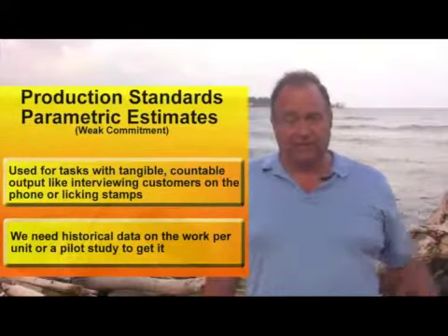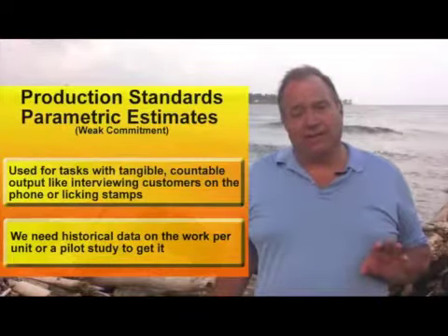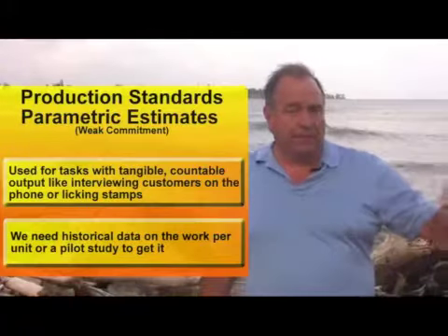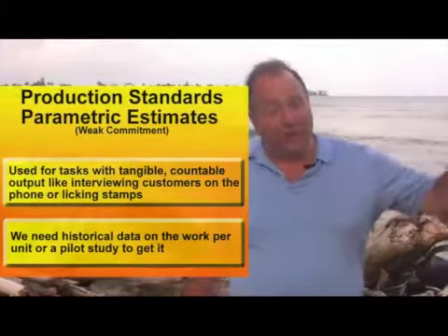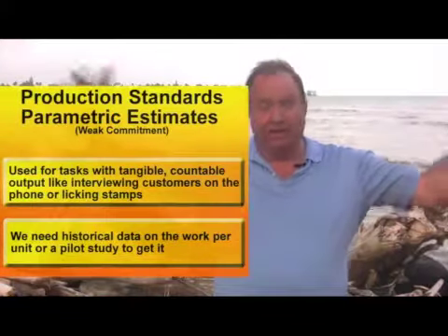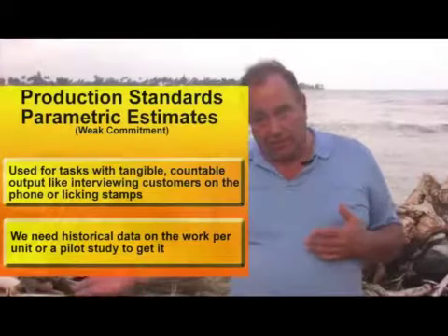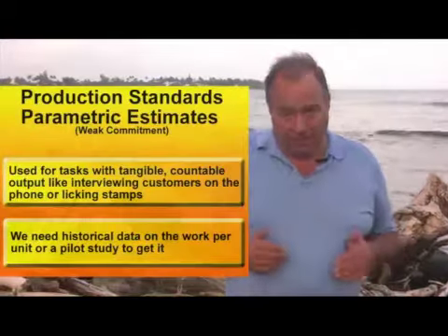Or let's look at this GUI computer data entry screen we're designing for our people, and we've got a couple that are similar. Let's see how much work they took. So we're looking at our history, again working with the team members, showing them the numbers. Here's how long Jim took when he did it 2 months ago.